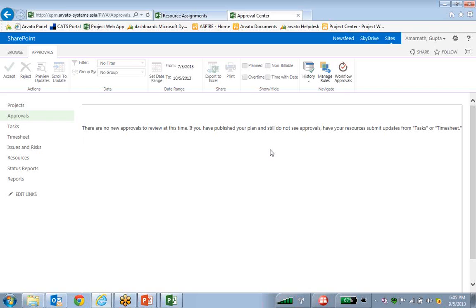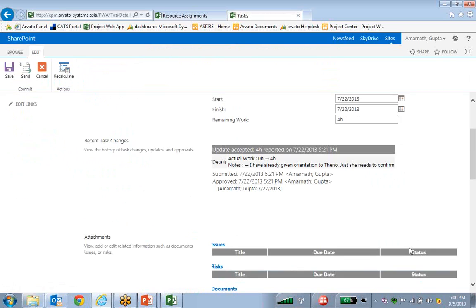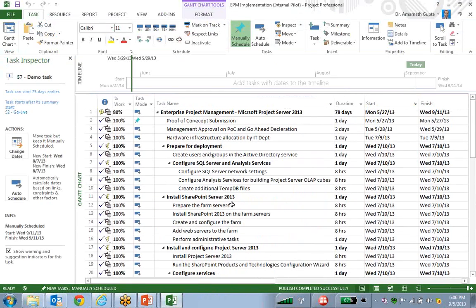Now, if somebody says that he has created one document or finished the coding of one particular object or form, the project manager can check and verify whether this has been done or not. If it is done, he simply approves it and the project progress will automatically be added. So by clicking one particular task and entering my information inside it, not only does it work here, but it updates my projects in total.